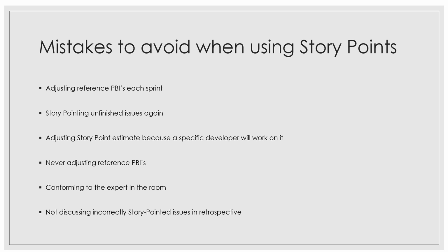The reason is that issue will still be open, and the estimates that you have given for that issue will not be reflected in your velocity because the issue is still open. And at a later point in time, for example during the next sprint, when the issue gets resolved, then it will automatically be taken into account as a part of that sprint velocity. So never ever do a re-estimation, even if, for example, you have estimated a story as 8 story points, and then you end up doing everything. It's just that some kind of testing and documentation is pending, and that makes the issue move on to the next sprint without the closure.